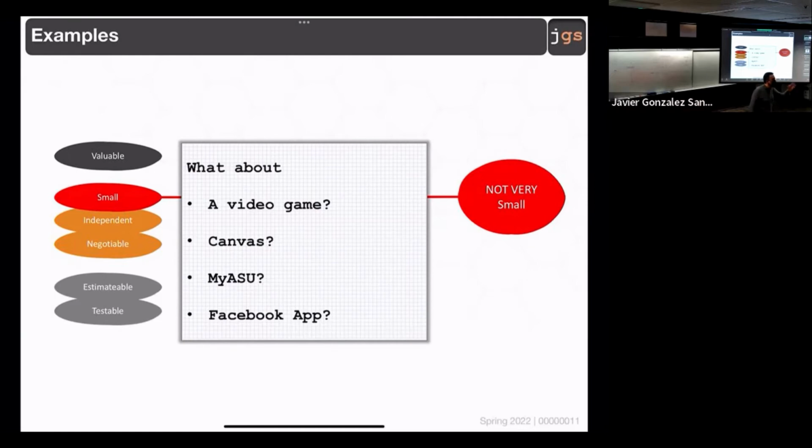We already mentioned that asking for, I want you to develop the Pac-Man video game, is not a requirement because it's not exactly small. Different idea, I want you to embed a Pac-Man video game in the application. That is not a requirement either. I need 5 requirements connected with Pac-Man. Can you help me? Ideas, functional requirements. Can you say making a video game is a task that we are dividing into requirements? Yes. If you think about this, develop a video game is what I, as a user, have as a project, the big picture, the epic that I want to achieve. As a task, that is too big.